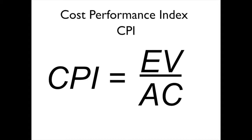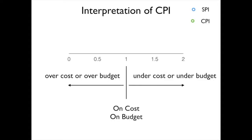We interpret CPI by looking at the value that we receive. If that number is greater than 1, we are saying that we are under cost or under budget. If it is less than 1, we are over cost or over budget. If we get a CPI value of 1, then we're right on target or right on budget.